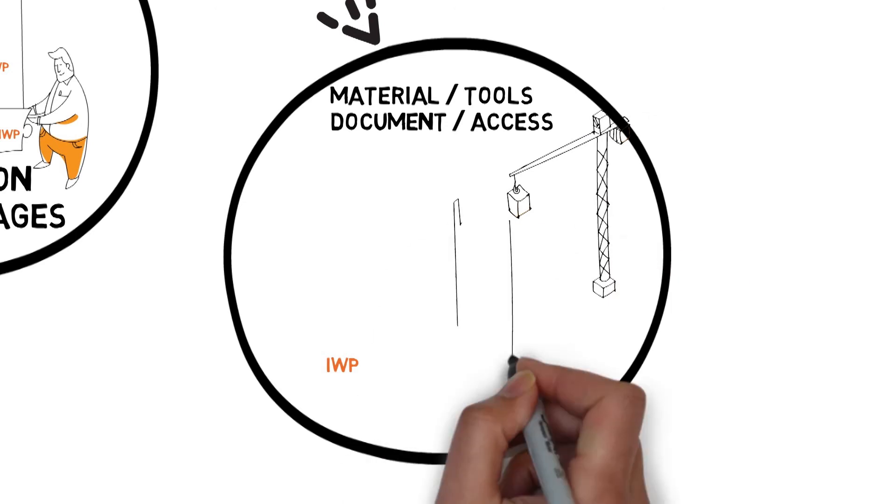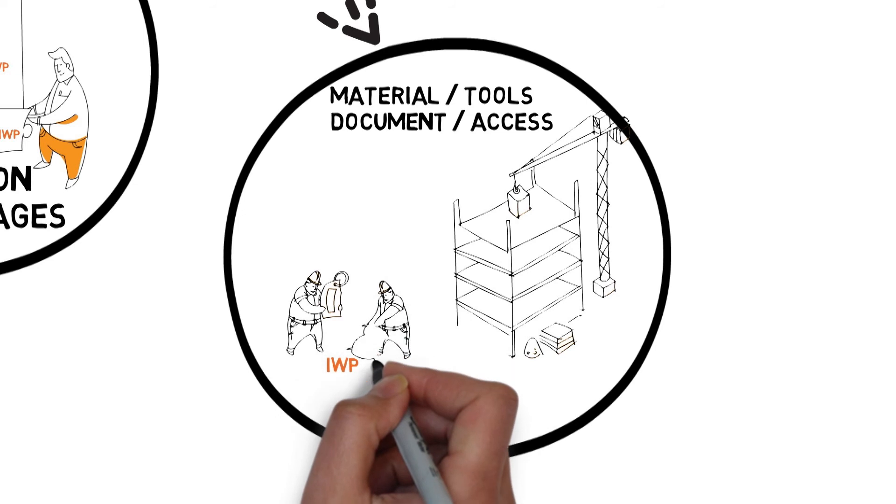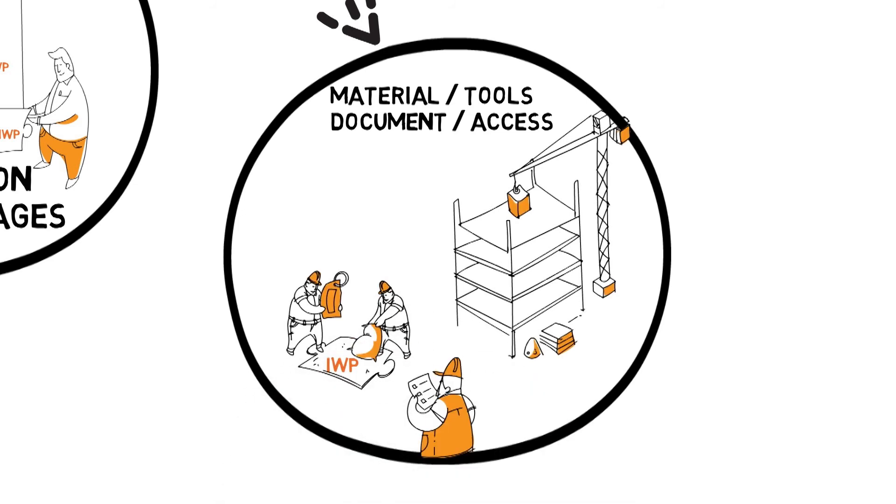Immediately prior to being issued to the field, the IWPs are re-checked to ensure latest revision documents, prerequisite work is complete, and that construction equipment is available.